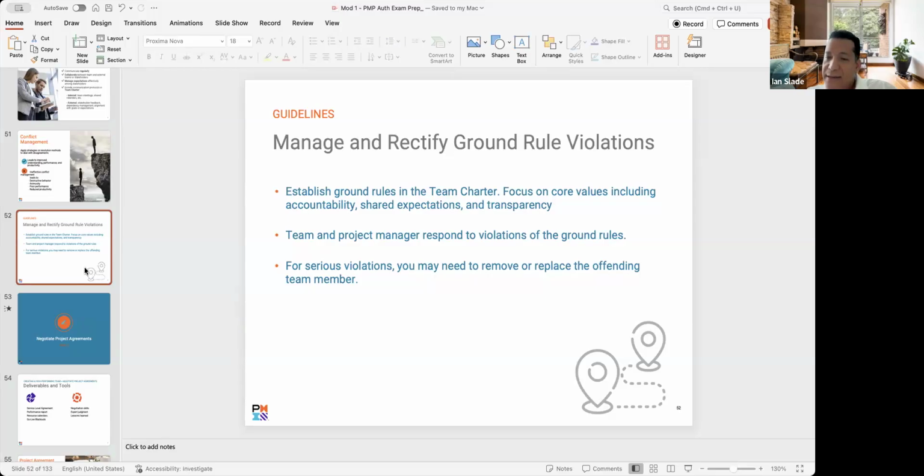So they were stalled for 18 months. We were able to get back on track in 6 weeks. So that's an example of how the ground rules at some point were violated by both teams, and how I was able to pull both to the negotiation table and figure out the floor and the ceiling. So remember that as you're bringing different parties together, try to figure out what their floors and ceilings are. What are the non-negotiables and what are the nice to have? And if someone violates the terms, bring them back to it.